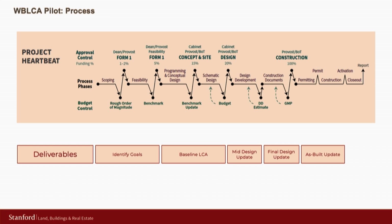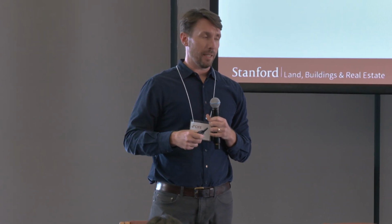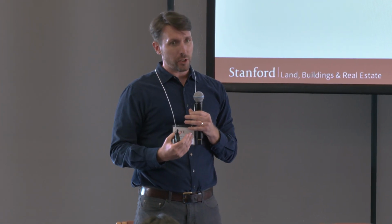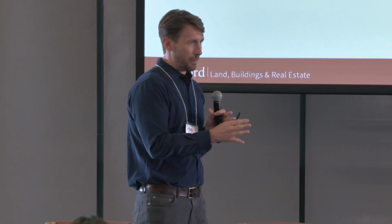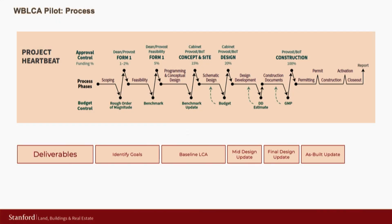And then at the end of design, we did a final design update. We also took it one additional step further and did an as-built update at the end of the project, where we took the actual material quantities from the contractors and our trade partners and said, hey, how much gypboard did you actually buy? We modeled it this way in our BIM model, but BIM modeling is not perfect. A lot of times contractors over-order materials, and so it's just a bit of data validation on our model.